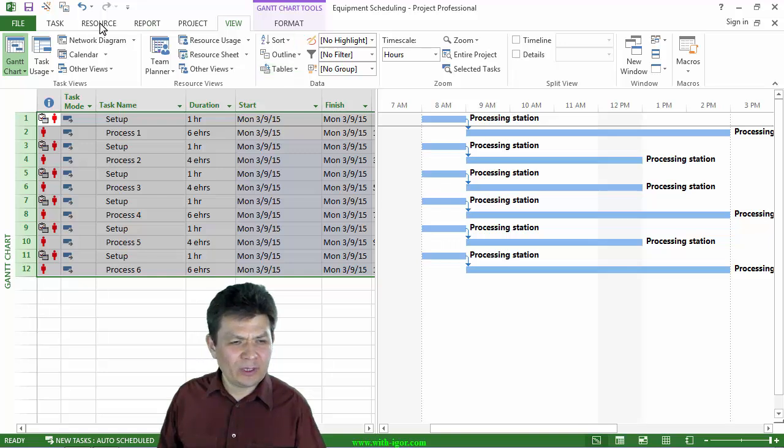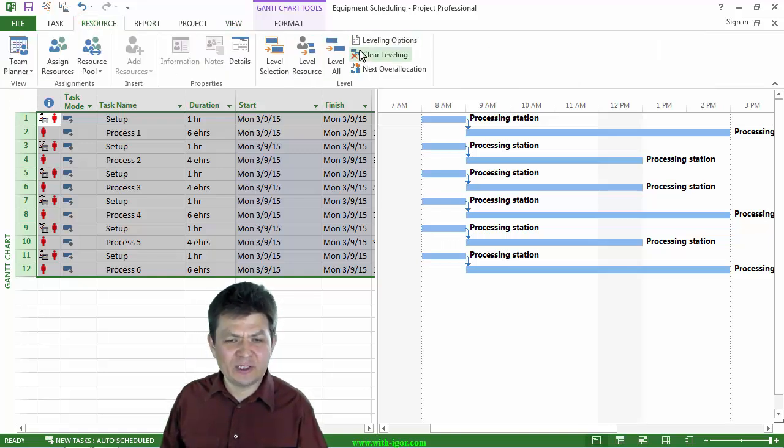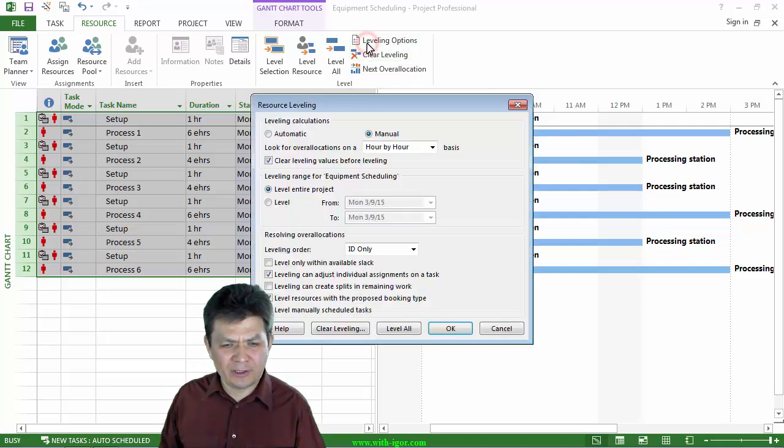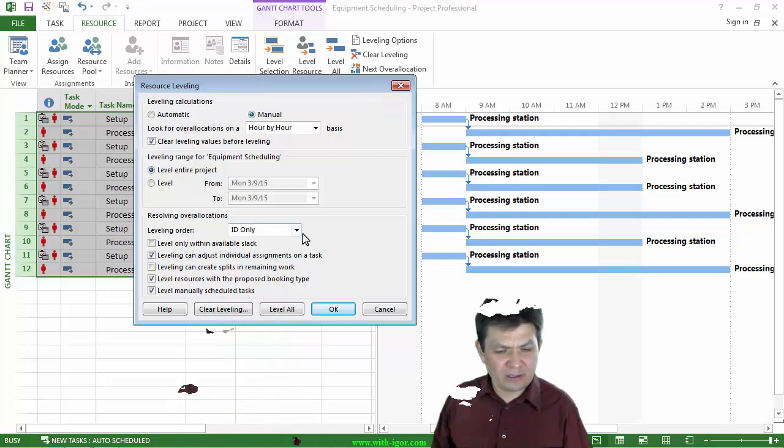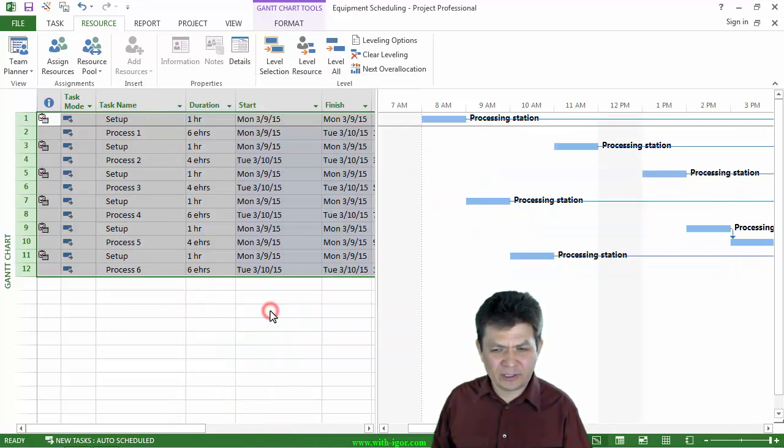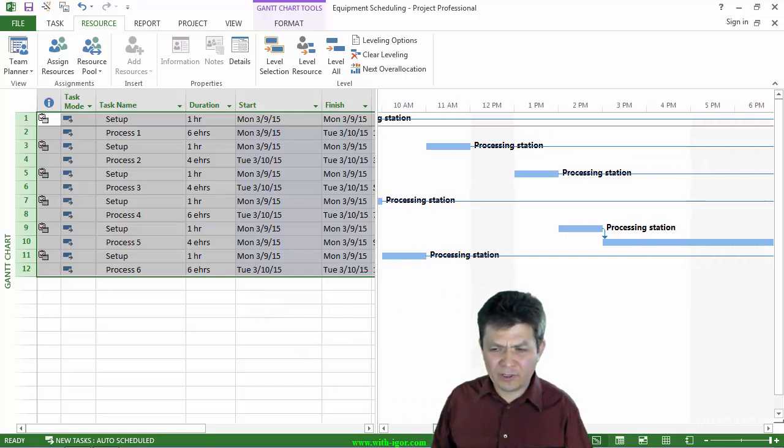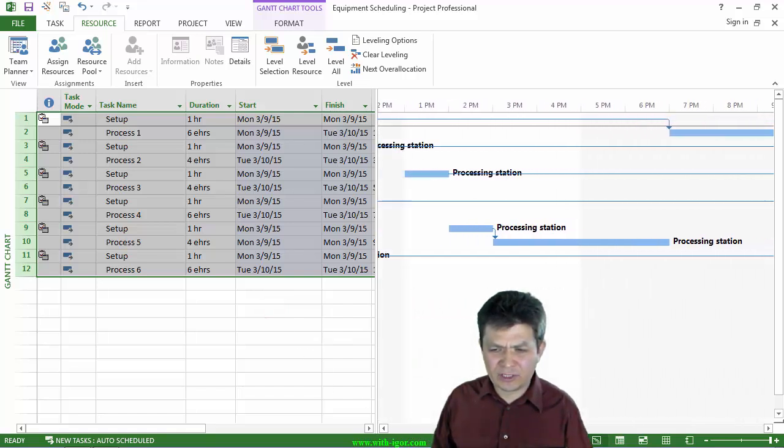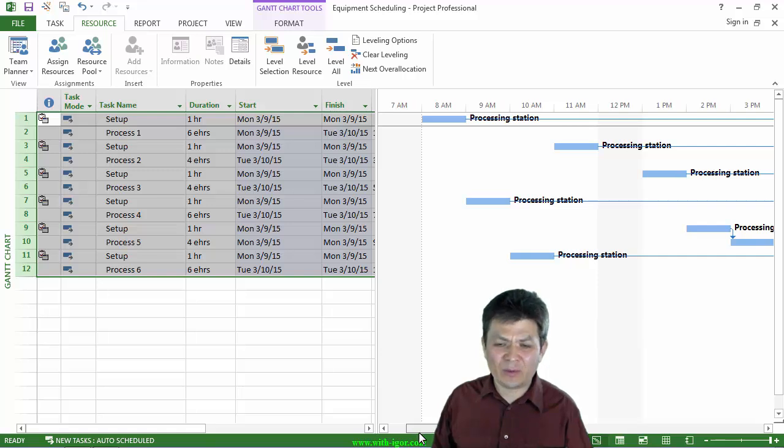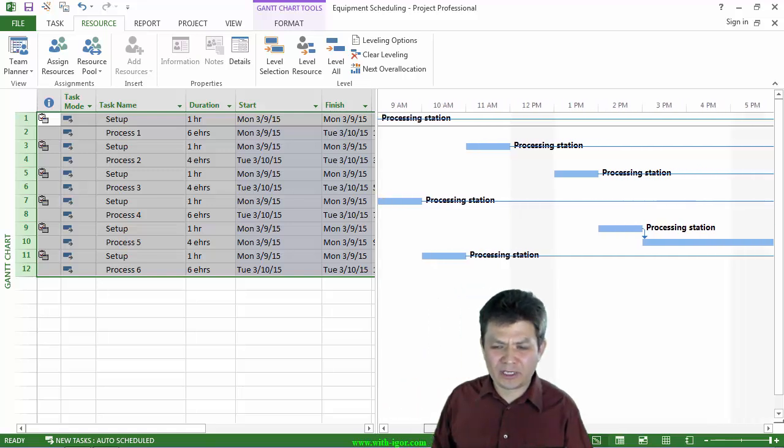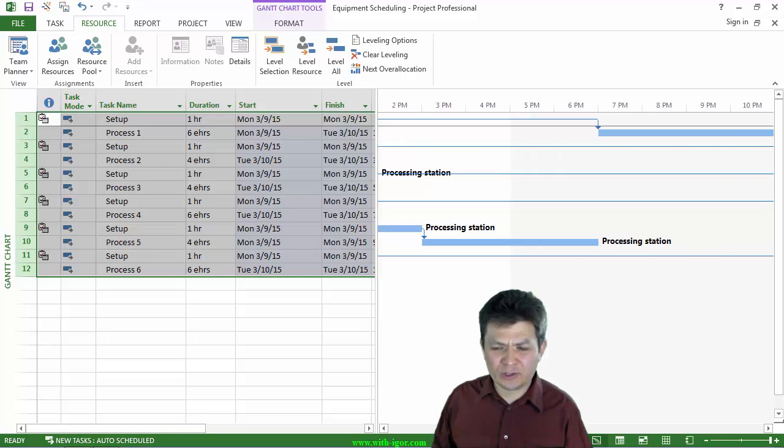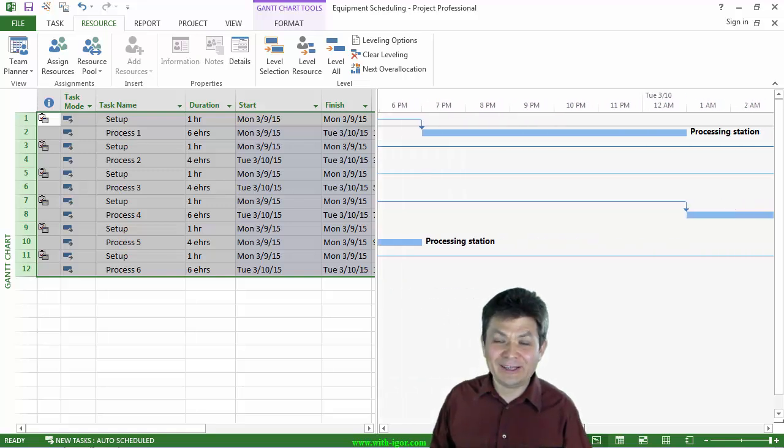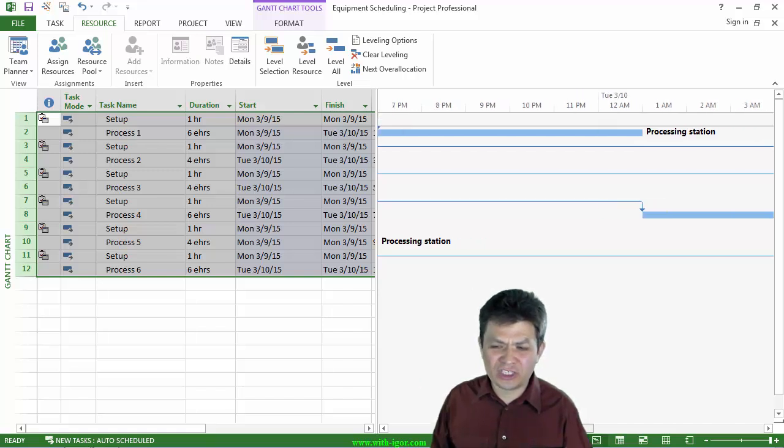What was important? I'm going to click on view entire project. So when I leveled, I mentioned that you really need to do it by ID. Let's see what happens if I don't do it by ID. I'm going to click on the leveling options and level order is going to be standard. And I'm going to click level all. So then I get very unexpected results. I have set up for each of the tasks leveled first and actually separated with some lag time before the actual processing task.